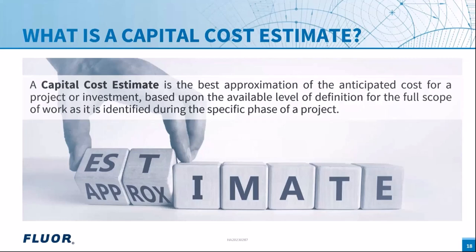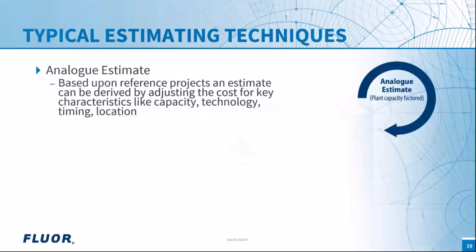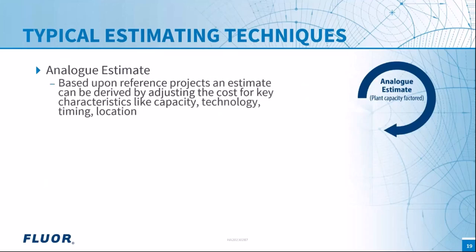There are three main estimating techniques. The first is the analog estimate, where we base ourselves on a reference project and derive the cost by adjusting based on key characteristics such as time, location, and technology differences. It is a fast and easy technique; however, accuracy is lower because we look at the overall picture rather than individual components.